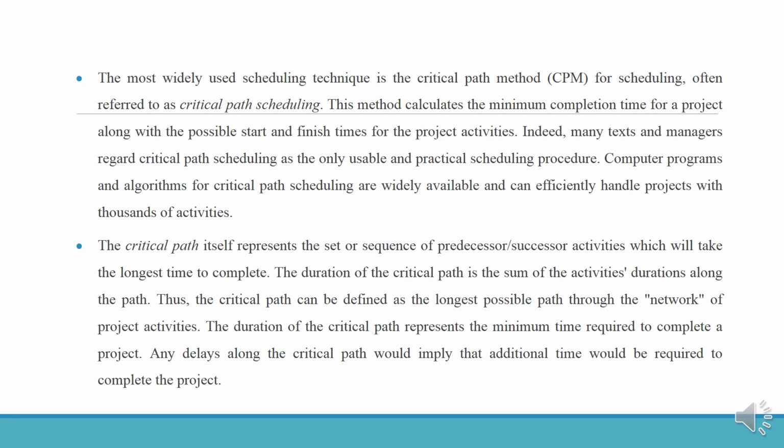The most widely used scheduling technique is the critical path method, that is CPM, for scheduling, often referred to as critical path scheduling. This method calculates the minimum completion time for a project along with the possible start and finish times for the project activities. Indeed, many texts and managers regard critical path scheduling as the only usable and practical scheduling procedure.